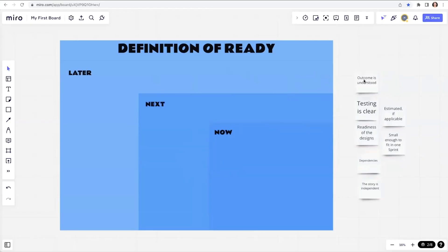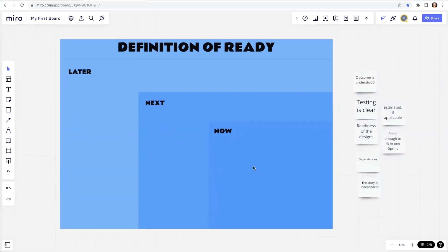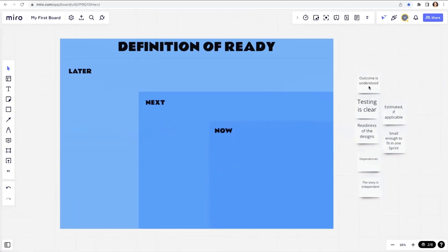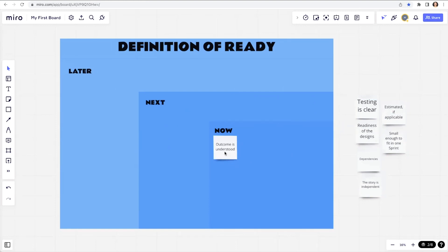So what would be the usual suspects for this definition? Let's go back to our template in Miro. For me, the first one would be that the outcome is understood — meaning acceptance criteria have been defined and understood by the team. You can have different ways of writing acceptance criteria and different ways of writing your stories. You with your team should describe what that means.